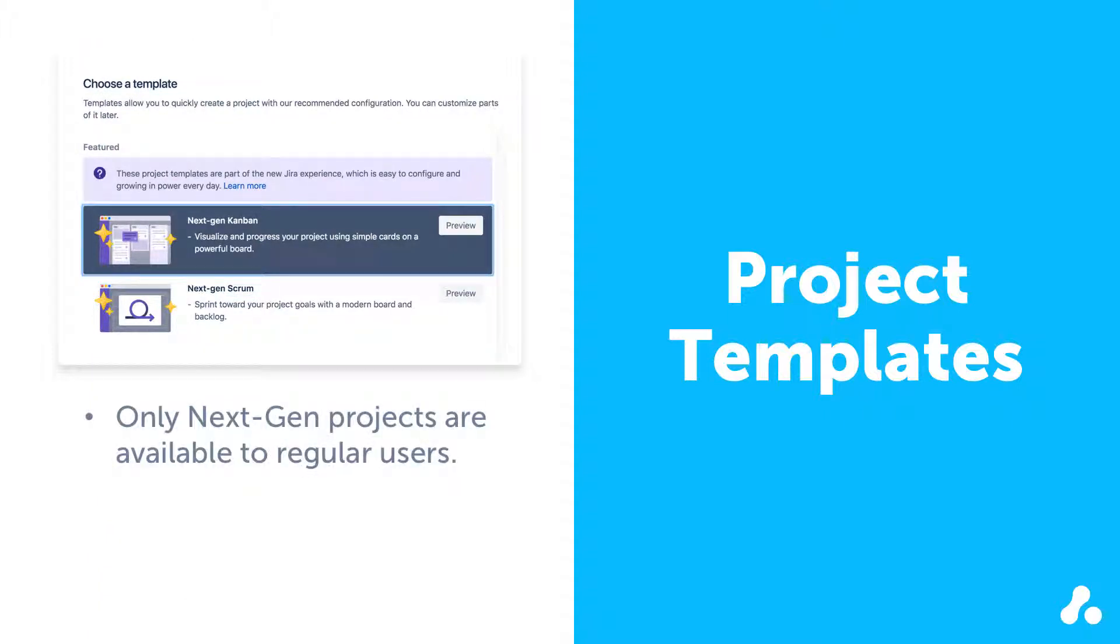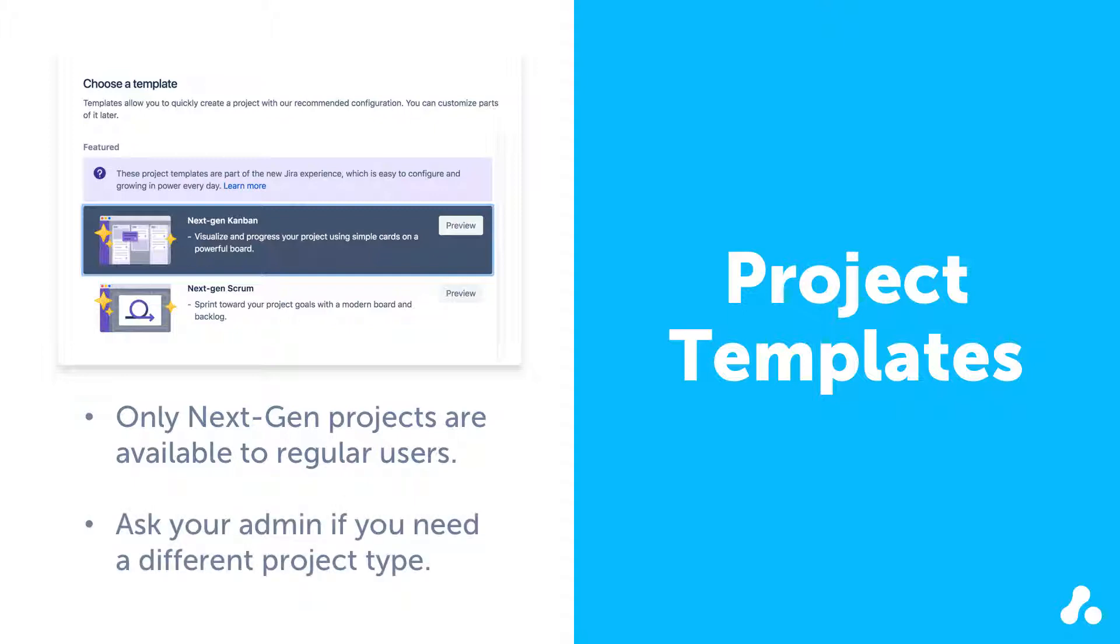Note that, unless you're a Jira administrator, you can only create next-gen projects. If you need a classic project, or one of the business templates, you should go ahead and request one following whatever process your organization has in place.